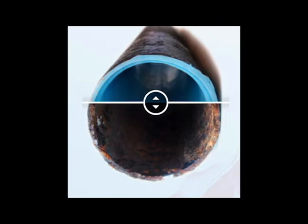Yeah. And although it was pretty costly to do, it was probably a fifth of the cost of ripping up the entire floor, not to mention the impact it would have to the project timelines. How long will that last, do you know? It has a 100-year lifespan that we were told. So it's epoxy, it shouldn't fail. I'd have to go look at the exact warranty on there, but the best part is if part of it fails, they could just come in and... It's not an actual sleeve.